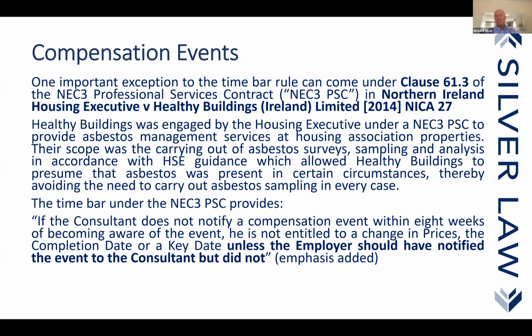If you were doing this today, you've just entered into a contract today, and you argue down the line, COVID's really had a problem because there's been another wave, hard luck, because whilst neither you nor the employer could have done anything to prevent it, you're both aware of it. We both know today that COVID is not going to be going away anytime soon, and therefore you would lose your entitlement.